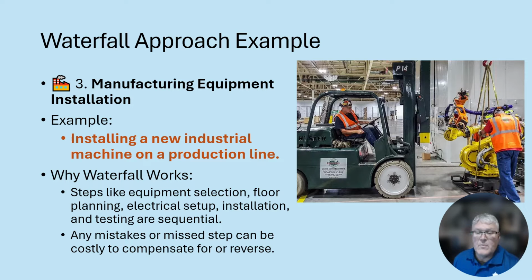Here's another example of a waterfall approach, installing equipment in a manufacturing setting. Why does the waterfall approach work here? Steps like equipment selection, floor planning, electrical setup, installation, process flow, and testing are all sequential. Any mistakes or missed steps can be costly to compensate for or to reverse.